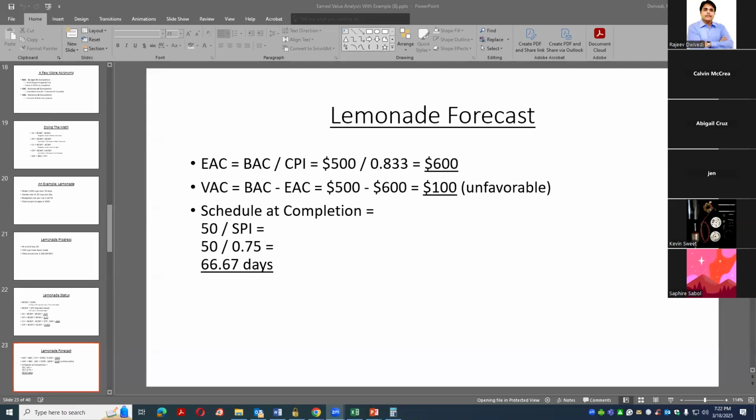But it is a 50-day work, you checked at day number 10 and you see this is going slow. You have these 40 days left. You can take management measures: you can speed up, you can tighten your team, you can ask them to work overtime in order not to go over budget and not to go over schedule.